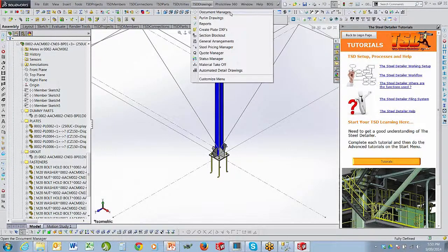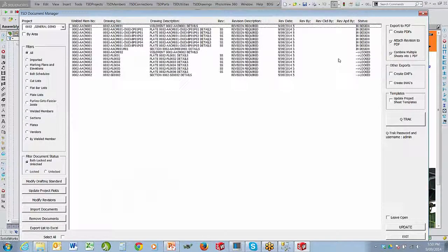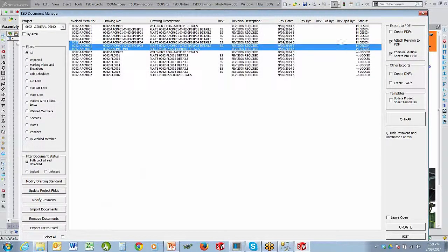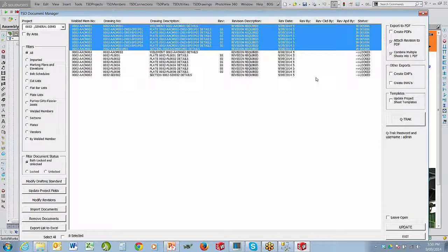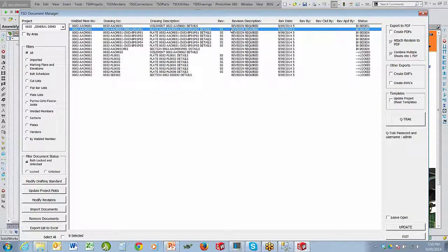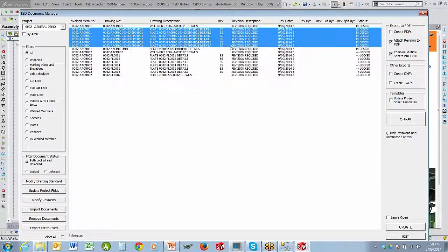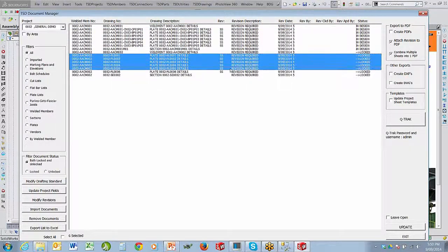We go up into the document manager, and now you can see the files that were locked are now back in design, telling you that there was a locked process in place. The files that were locked that have been adjusted, which are these guys here, are now being made superseded in your list to tell you that whatever revision you had in there, it now needs to be bumped because you may have issued the drawing to your customer.